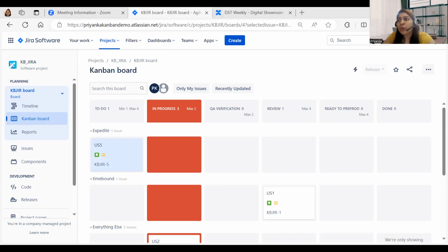For example, one of the rules could be that there cannot be more than 2 urgent items in a week, which helps your team manage and define what could be an urgent item. And that is how the answer would be yes, you can break this rule and change the WIP limits, but that should not be the general case, just a very, very rare scenario. I think that's about the Kanban board and about WIP limits, which are the centerpiece of a Kanban board.